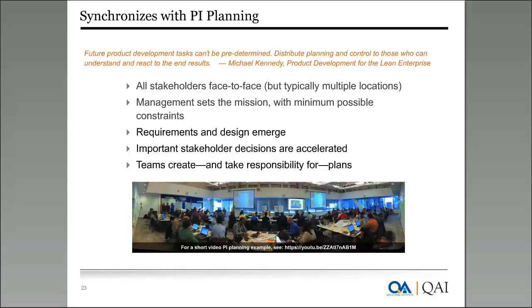The purpose of program increment planning is to get all the agile teams to meet. Even if there are 10 teams, all the 100 people need to meet face to face most of the time. If it is a large organization, then you need to find workarounds through video conferencing and other means. Otherwise, the suggested method is to have a face-to-face meeting. Program increment planning is a 2-day event.